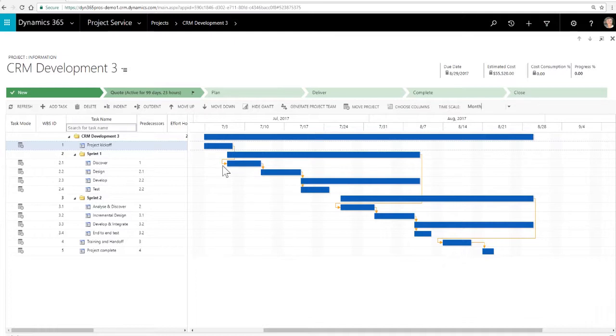And you can assign costs at the role level or costs at the actual resource level. And generally you do both, because when you just have the assigned roles, you want to see the initial cost during the sales process. But then as you get into the individual resources being assigned after you've closed the deal, after it becomes a real project, that's when it really starts making sense, right? So let's just kind of move this over a little bit and give us a little bit more real estate here on the Gantt calendar.